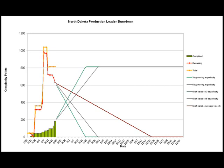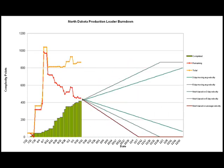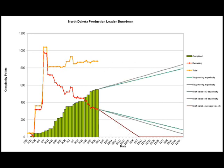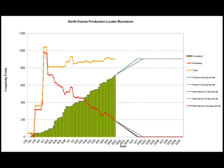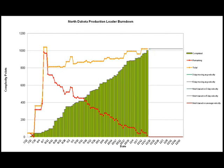From here until the end of the project, the average velocity finish line consistently showed a finish date between October 25th and November 25th, with most predictions falling in the first 10 days of November. As is common with many software projects, the end date was later than this, due to factors such as bugs being discovered late in the project, allowance for some time at the end for final testing, and a deployment window. We have found that tracking progress using the burndown chart has proven to be extremely beneficial to the team and our business as a whole. It has helped us to see where the project is, where we are going, and make course corrections along the way.